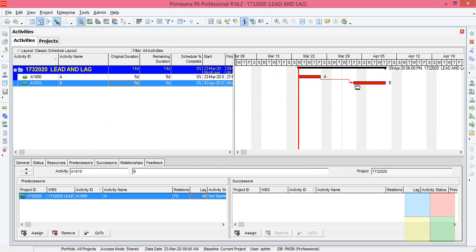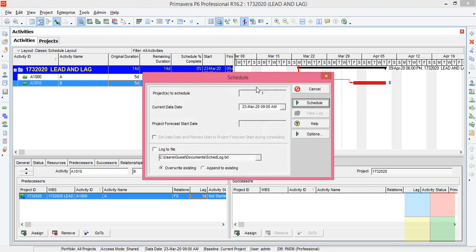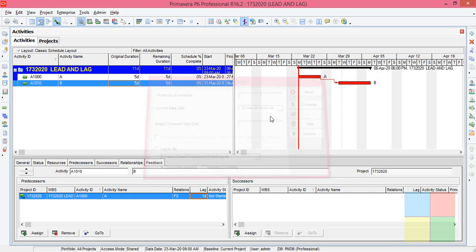Can you see here? It will start on the next Friday. It will delay the activity by four days. Should have started on Monday. Since I gave four as the lag, it will start on next Friday. The same way, if I change it to one. Now let us update it. See, the second activity is getting delayed by one day.